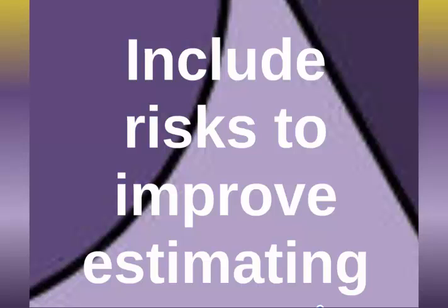Generally, of course, the contingencies should reduce as the project progresses, but this will not be the case if significant new risks are added after the project is initiated. It is therefore important to be rigorous about assessing risks when initiating a project.